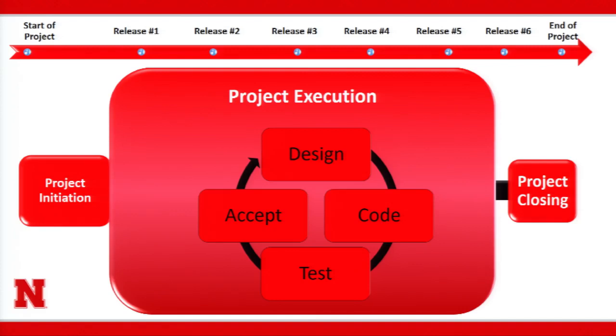Let's say one of your features is that you want to be able to, on that app, bring up a template of different things that you would announce, and one of them would be a grand opening for a new store, right? Your acceptance criteria might be real specific, saying, using Android, written in Xamarin, I need to be able to log in and be able to pull up a template that has the grand opening option available. If that acceptance criteria is met, then I, Kevin, as the product owner, am good to go on that test case. Check.